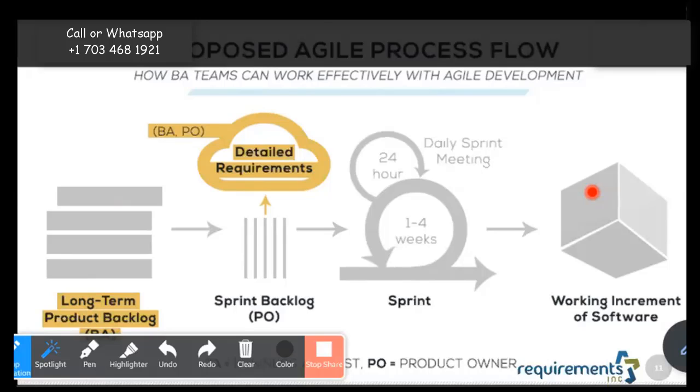So getting it ready to go out the door, ready for showcasing to the customer, means you should not have links that are not working. You should not have any issues when you're navigating around. Everything that was committed should be working independently for that tiny bit of software. So you might do very small progressions, but those progressions should be complete and rounded, finished, well thought out. Nothing should be midway, hanging in the air.